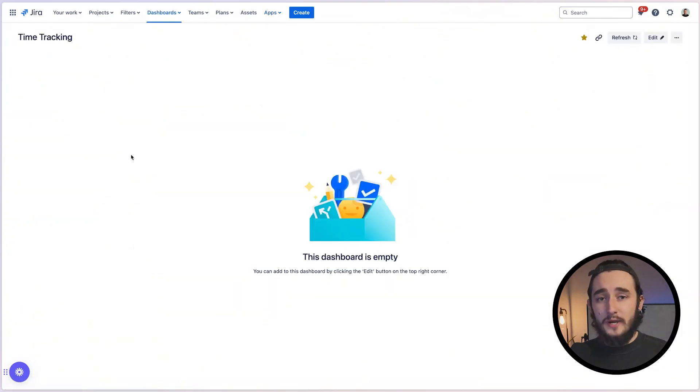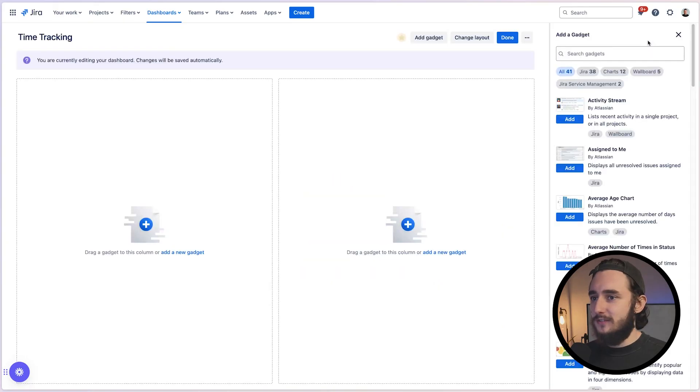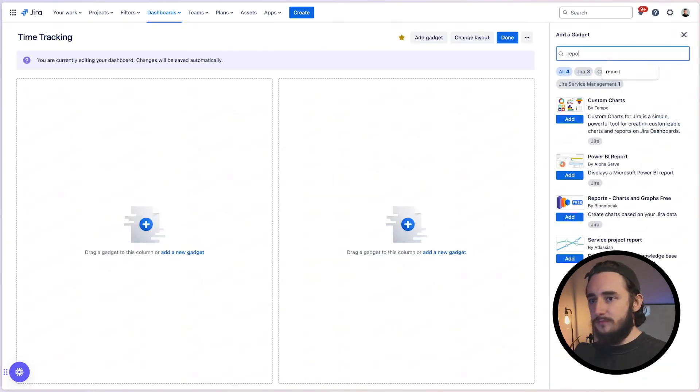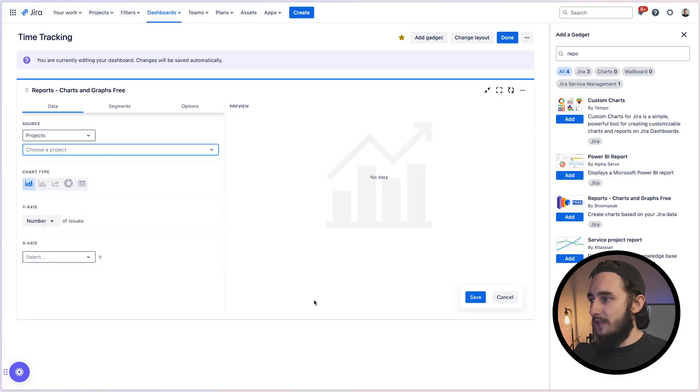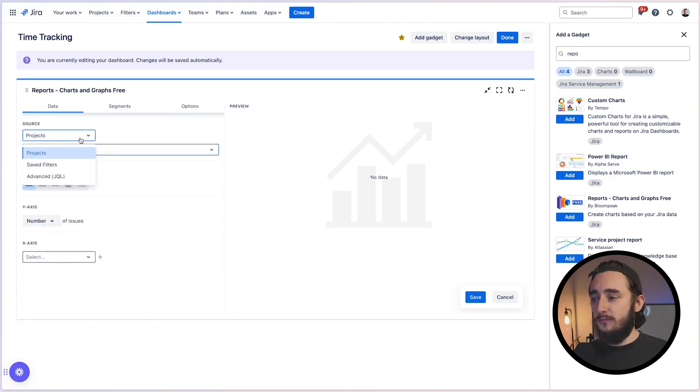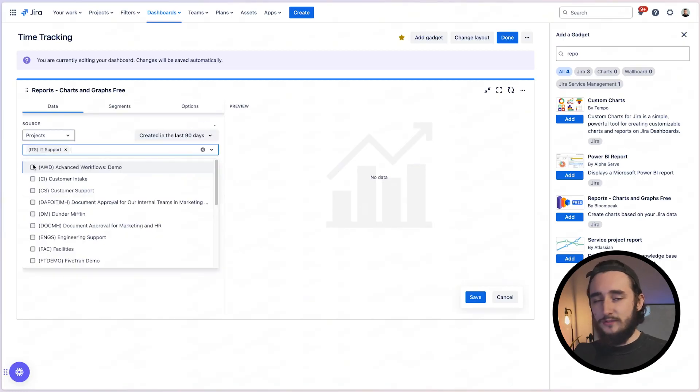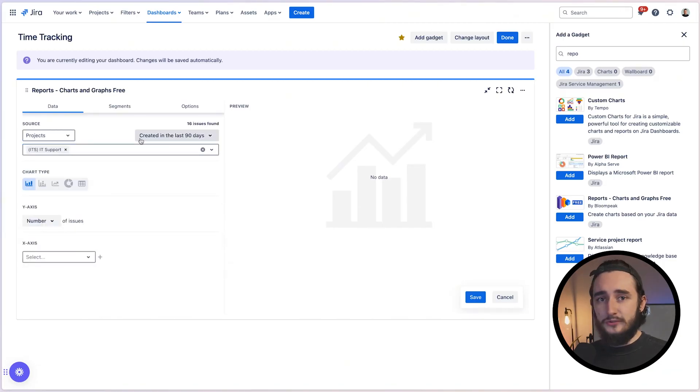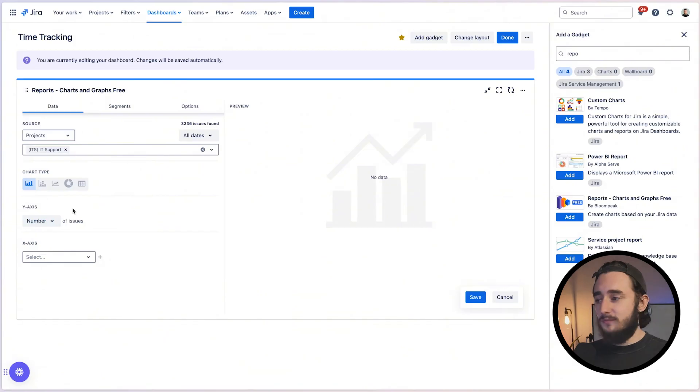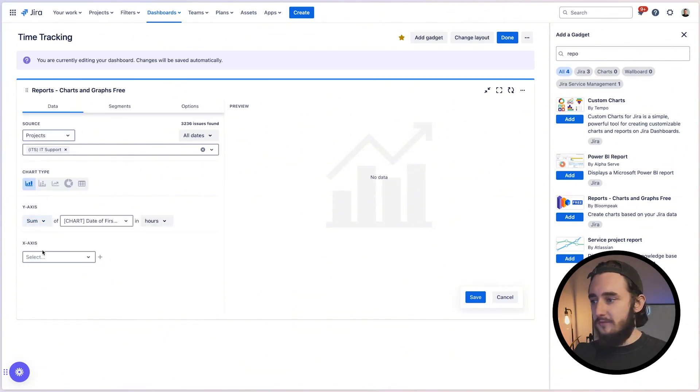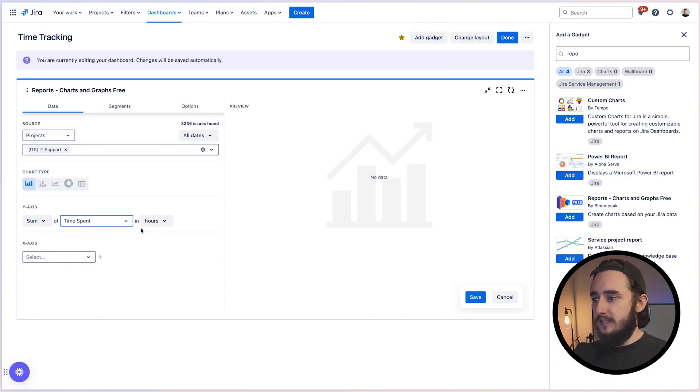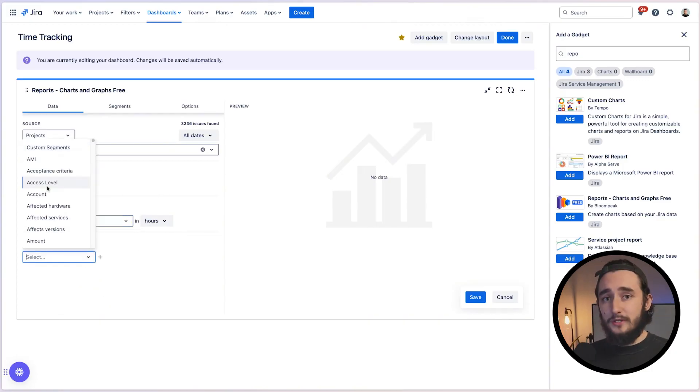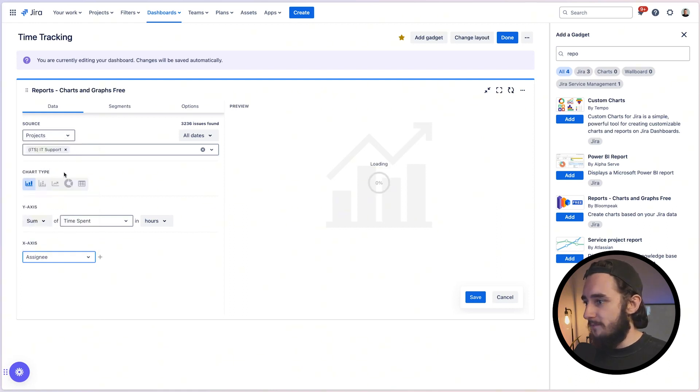Once installed, you could go ahead and create a brand new dashboard. And I have a time tracking dashboard in here. I'll go ahead and edit this dashboard. We'll go ahead and find the plugin that we just installed. Reports, charts, and graphs free. I'll add that in here. I'll change the layout just to show this as one big screen. And then in here, what we're going to do is select a source. This could either be a filter, custom JQL, or a specific project. Let's go ahead and just find the ITS project, since that's the one we were just testing on. We could also filter down by when these tickets were created. I'll just say all dates to show me everything in this example. So for the y-axis, I'm going to hit sum because I want a total number of hours. And then I'm going to search and find the time spent in hours field. And then on the x-axis, maybe I want to see this broken down by assignee. So I'll go ahead and search for that, add that in, and our report is generating a preview.